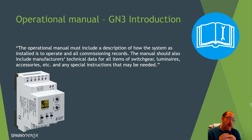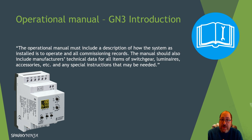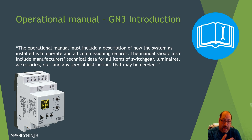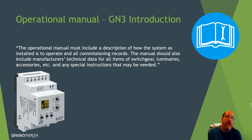With the operational manual, check that any equipment, switchgear, or residual current monitors and installation monitors are set as they should be. Make sure the user has instruction on how to maintain or monitor these settings. A great example of something often overlooked is RCD testing — we put a sticker on the consumer unit saying 'test quarterly,' but I've done gap analyses where people had no idea what that meant. You've got to pass instructions to the client so they can effectively maintain the electrical system until the next periodic inspection.